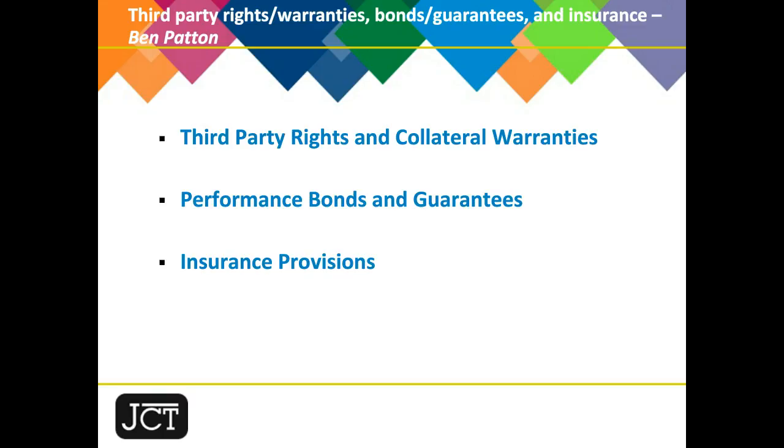Now, in terms of insurance for the works, there continues to be 3 principal joint names works insurance options set out in Schedule 3. Again, if you look at the D&B form and standard building contract forms, option A remains new buildings all risks insurance of the works by the contractor. Option B remains new buildings all risks insurance of the works by the employer. And option C, insurance by the employer of existing structures and works in or extensions to them.